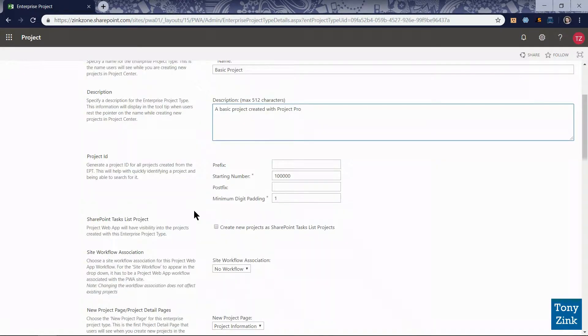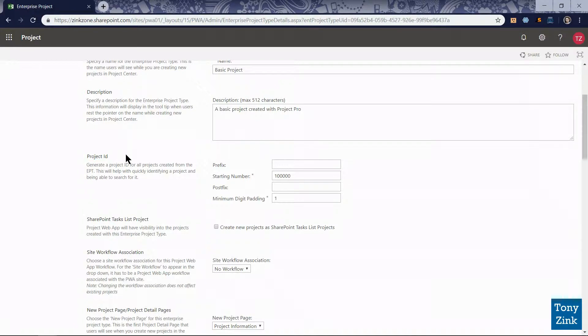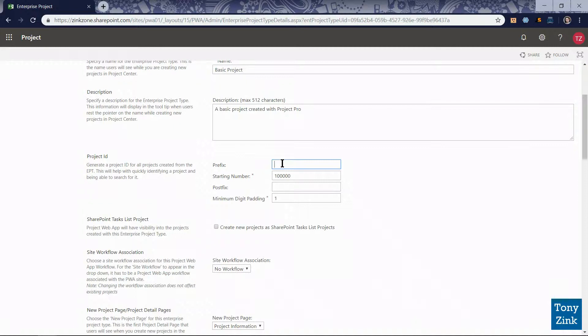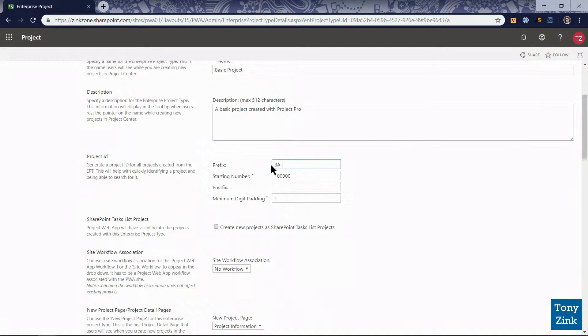Moving on down the page here we have some options for configuring the automated project ID numbering for all new projects that are created under this enterprise project type. So every basic project that we create in the system will have a numbering scheme that we can define here starting with the prefix. As a best practice I like to add a prefix on the beginning of all of my project numbers for this enterprise project type that someone can look at and they can tell right away what the enterprise project type is. Since this is a basic project I'm going to put a prefix on there BA dash or BA hyphen. That'll be put on the beginning of every project ID number that's created for basic projects.